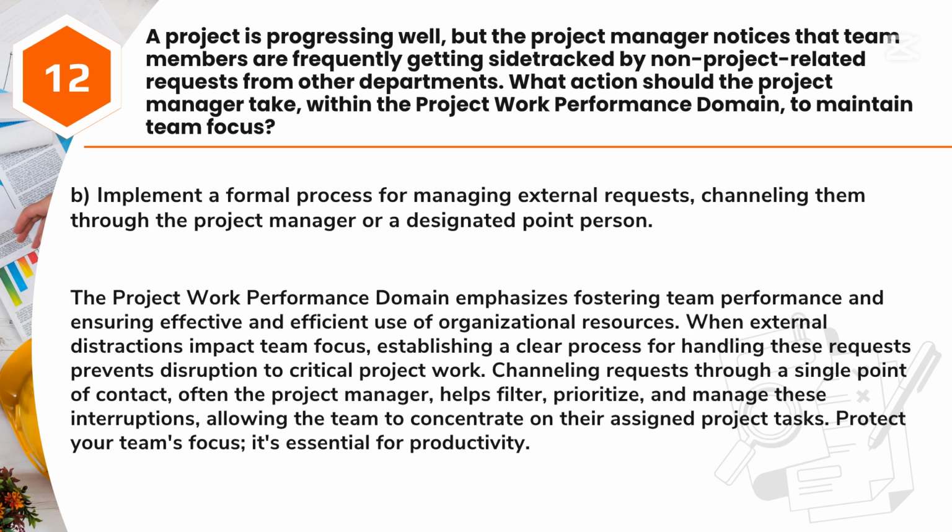Answer: B. Implement a formal process for managing external requests, channeling them through the project manager or a designated point person. The project work performance domain emphasizes fostering team performance and ensuring effective and efficient use of organizational resources. When external distractions impact team focus, establishing a clear process for handling these requests prevents disruption to critical project work. Channeling requests through a single point of contact, often the project manager, helps filter, prioritize, and manage these interruptions, allowing the team to concentrate on their assigned project tasks. Protect your team's focus, it's essential for productivity.